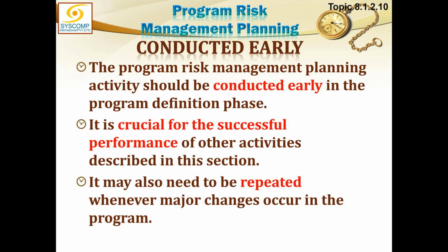This is very simply written here. It is not only whenever major changes occur, but we have to keep doing the risk assessment, risk identification throughout the life of the program after regular intervals. We don't wait for some changes to come, but otherwise also we keep doing them on a fortnightly basis or something like that.